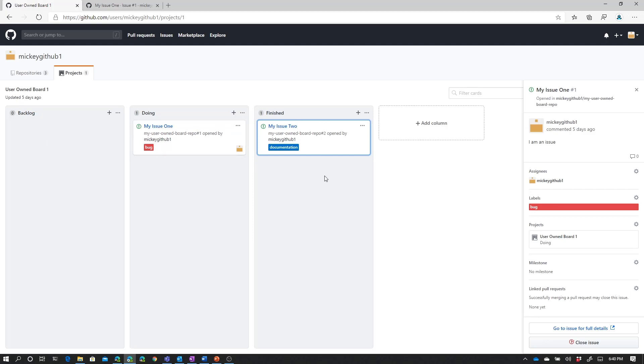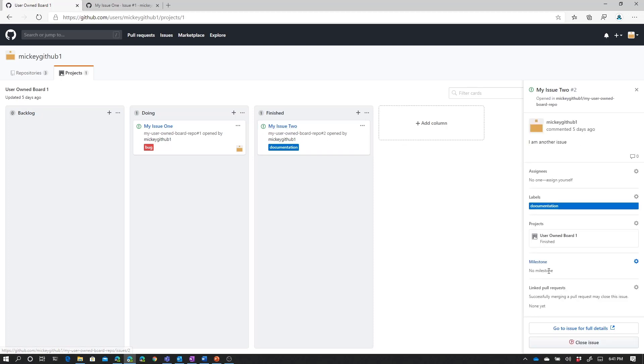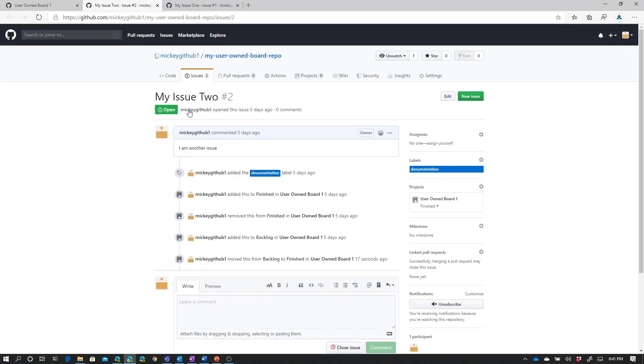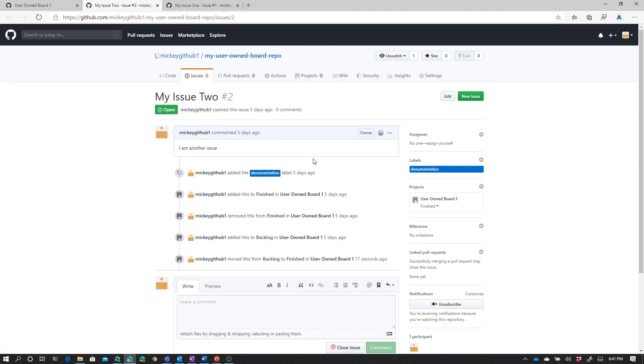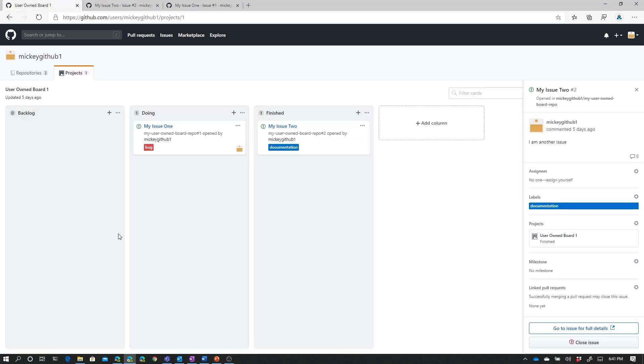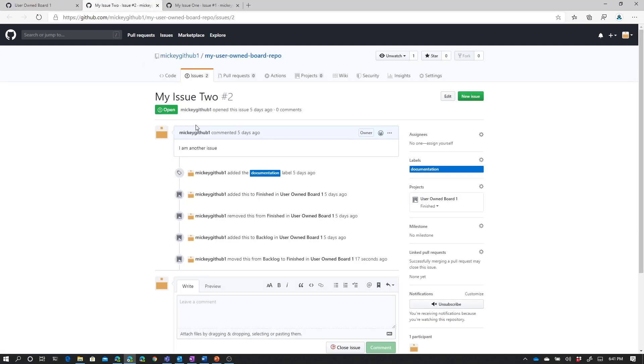If I go look at the issue itself, this issue is still open. So moving it from one column to the other doesn't make any changes to the actual issue. It's just modifying where the card is in your process. It's in the Finished column, but the issue itself is still open.